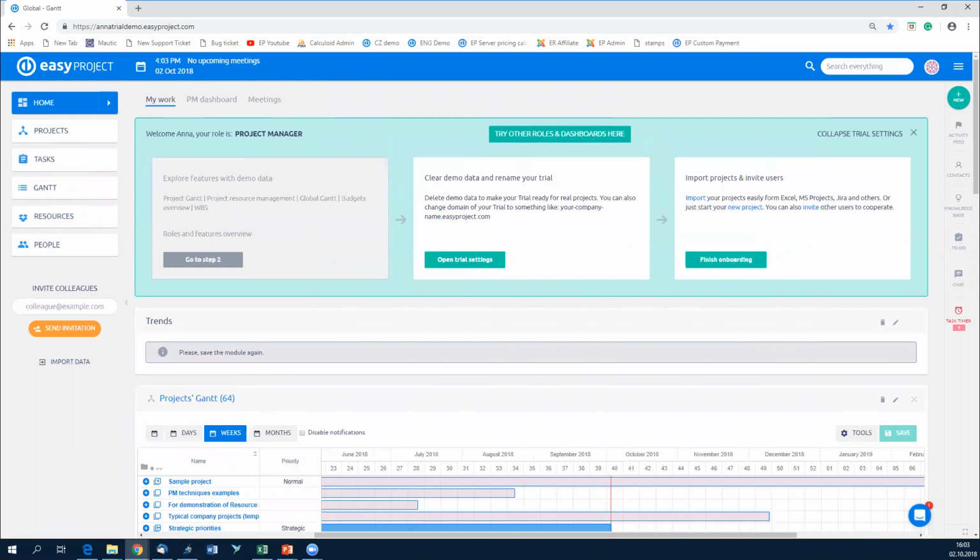The manage by stages principle is very much tied to the processes, because managing by stages means that we have several stages of the project. Each stage has several steps, and each stage is evaluated, which means that at the end of each stage there is an evaluation, there are updates of the documentation, and there's a decision to be made whether to go ahead with the project or to stop it where we are right now.